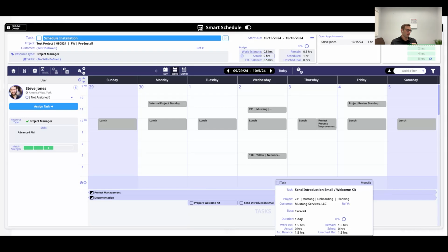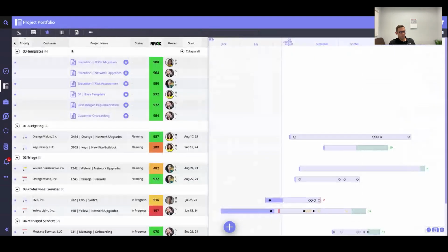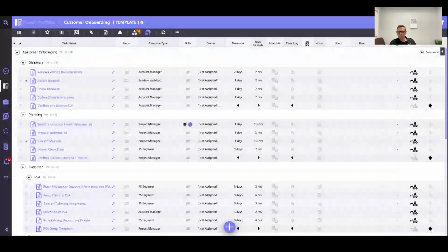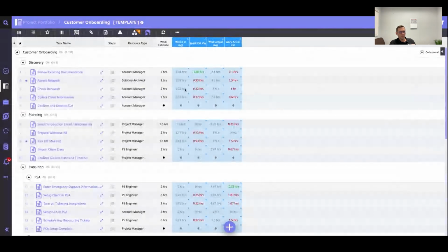Yeah. So we try to listen. The other one that we heard about a lot at IT Nation last year was the analytics against templates. Just real quick, and then anything else you want me to pick apart in here, absolutely. We heard that a lot in November, so we rolled this out in February or March of this year. Essentially, you come into your templates and ask, how am I doing compared to what I estimated? So, I thought assessing the network would take me 2 hours. On average, I'm updating those work estimates on those project plans to 2.33, and on average, based on time entries, it's actually taking me 4.3 hours.